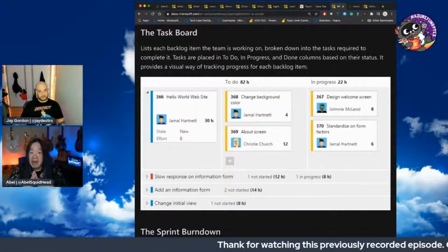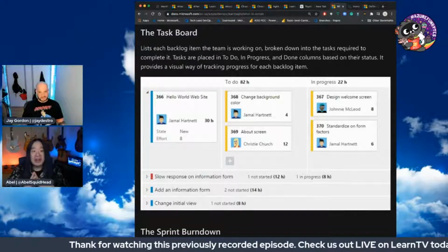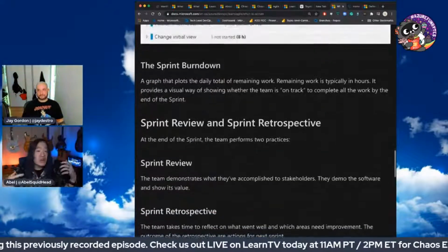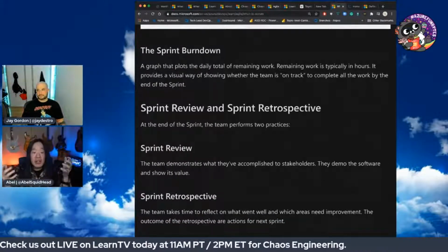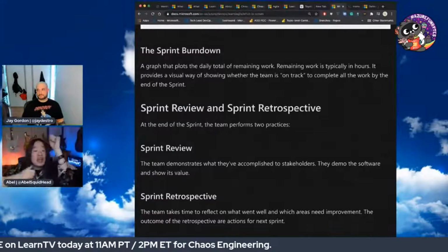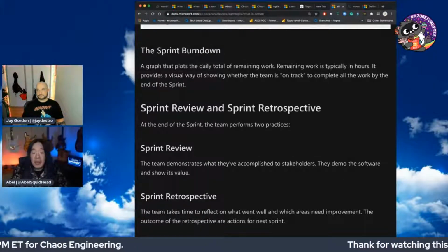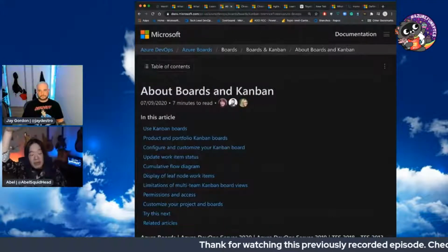Scrum Master does not prioritize that backlog, right? The product owner prioritizes it. So a backlog is just an ordered list. So no matter what type of tooling you use, or if you happen to use sticky notes, literally your backlog is a list of all the stuff that you want done, right? Or you think you want done. The product owner needs to come up there and then prioritize it. So the most important thing goes to the top, least important things fall to the bottom.